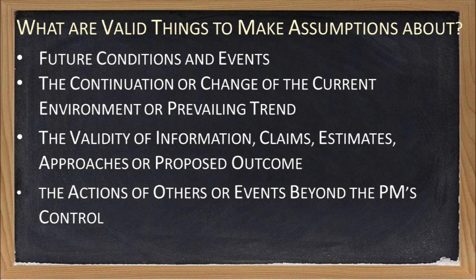might be encountered in the future, the change or continuation of current trends or the environment that the project's in, the validity of dates that you are basing your project on or other assumptions, what actions others might take with regards to the project. The key is that your assumptions need to be conditions that you cannot easily prove or disprove and are beyond the direct control of the project manager or project team.